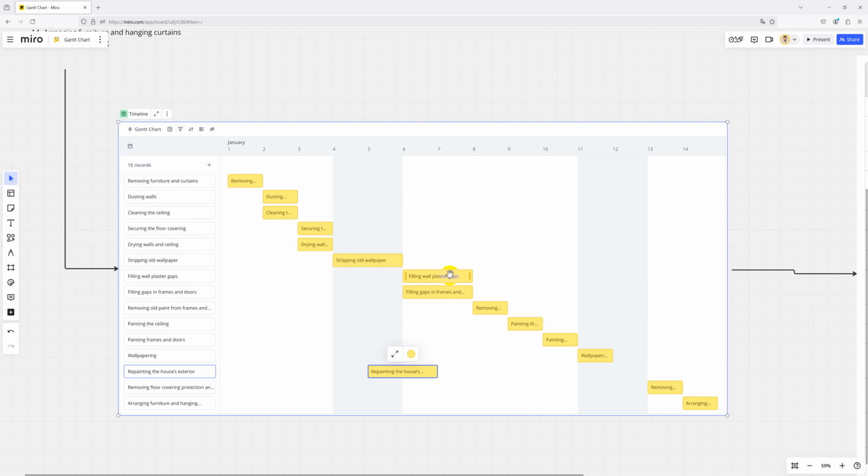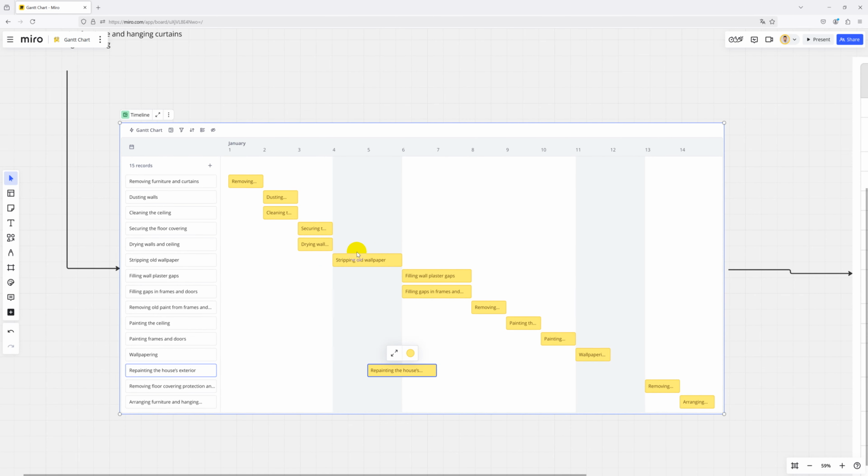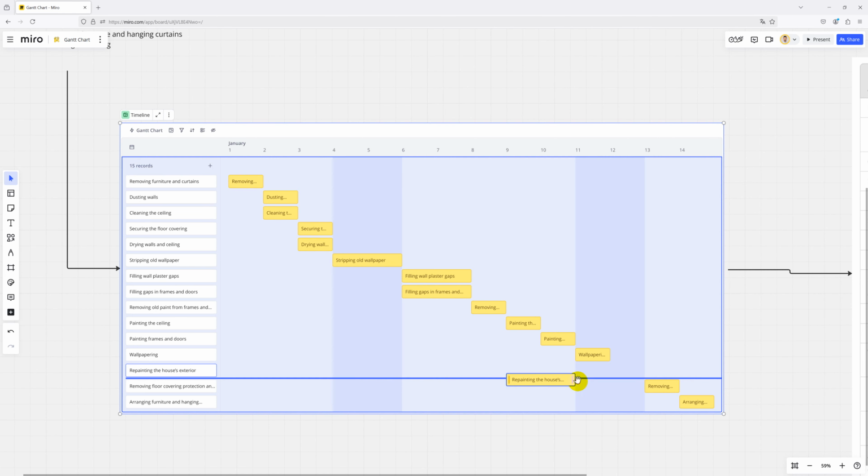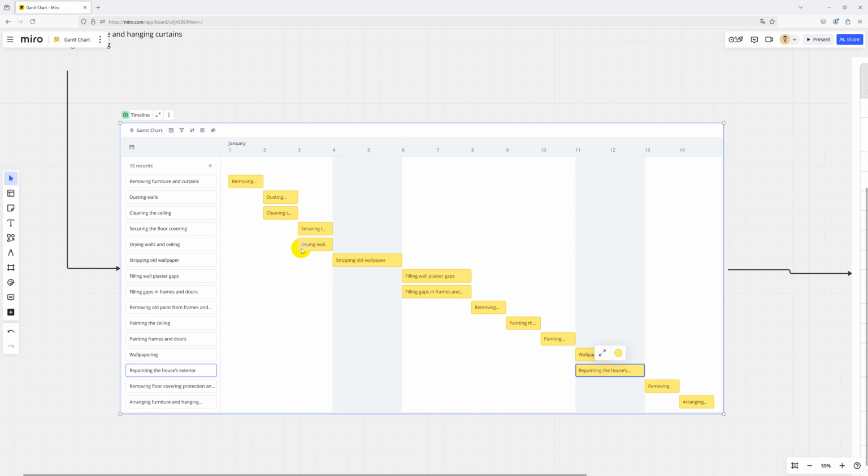So we call this depending activities related with everyone, and they can be on the critical path, because if we assume that we cannot start the activity before the previous is ready or accomplished, then we need to estimate the project completion time with regards to the old activities that have to be started one after each other, and this will give us a critical path.